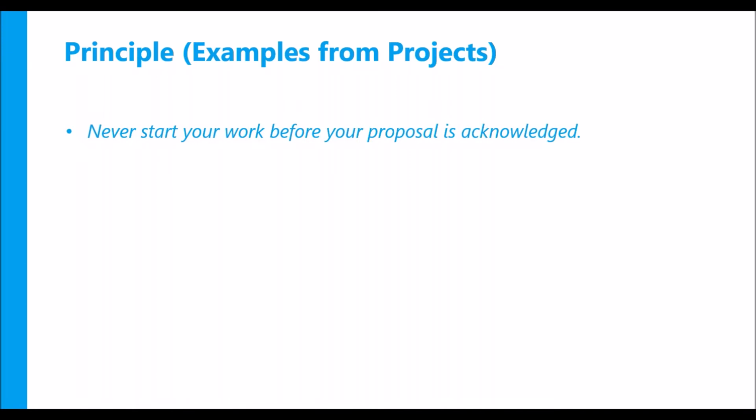Never start your work before your proposal is acknowledged. That can be a principle, right? You commit something to the customer, but the customer has not acknowledged. You start working on that. Customer says change in plan, your effort goes to waste. So you can have this as a principle.